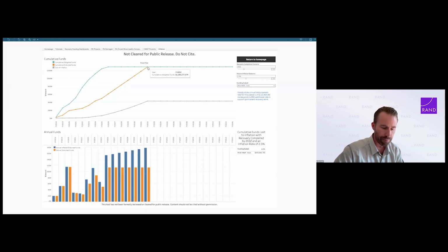If, however, that 426 million is greater than what was baked in those initial cost estimates, well, then it's a question of what's the funding mechanism that was used on these grants. If it was 406, then FEMA pays those costs if there's any overruns due to inflation. If it's 428, then the applicant pays those costs if there's any overruns.